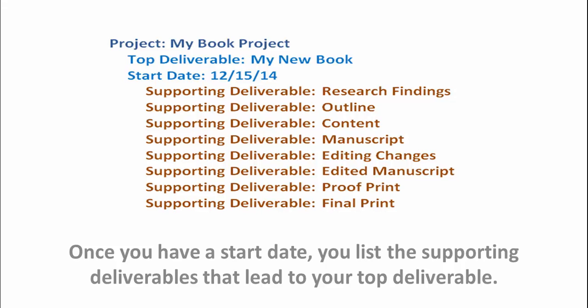Next, you try to list a handful or so of supporting deliverables. And these are the deliverables that lead up to or contribute to your top deliverable. Here you can see we've got kind of a sequential list of supporting deliverables that start out with research findings up here and end up with a final print down here.